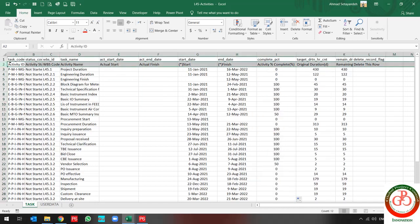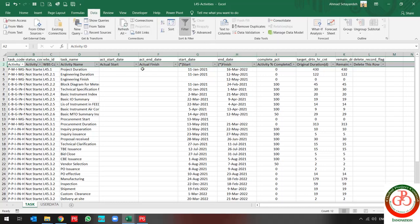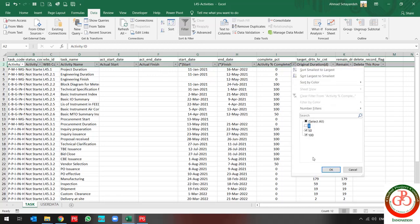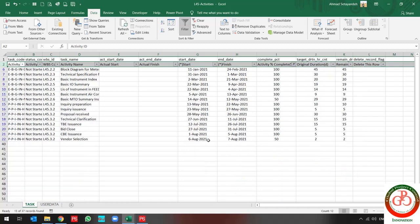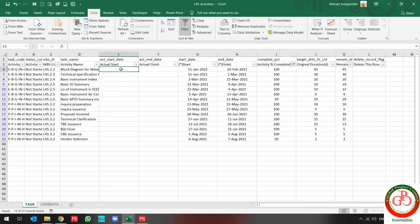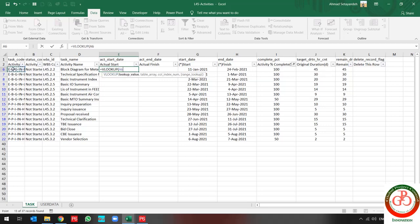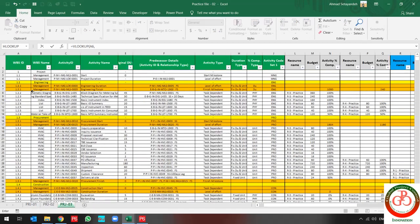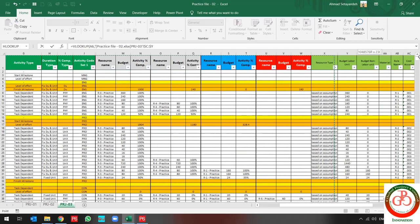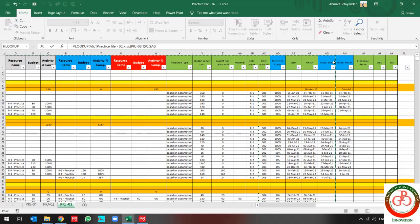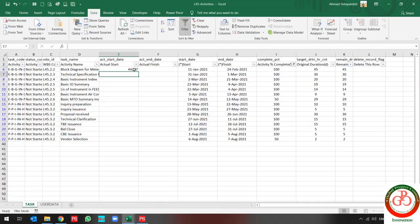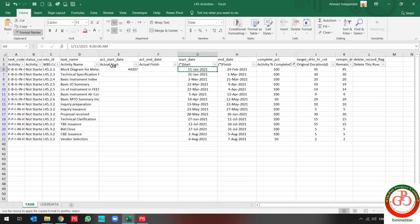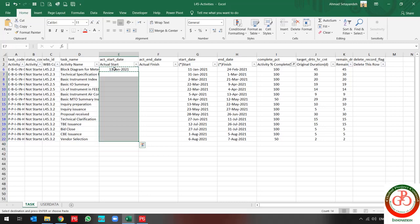According to my activity percentage complete, I'm going to look for actual start and actual finish. Let me do a filter for activity percent complete. Now I use VLOOKUP for my actual start date from this sheet, from activity to actual start. I also need to change the format for that, like what I did for start and finish.